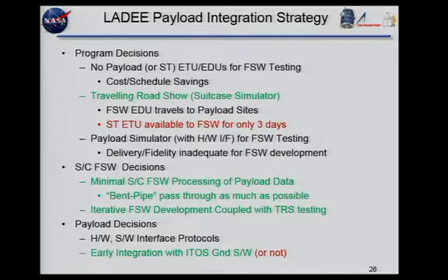We should have planned to go somewhere and do more integration testing. The other thing that was planned was to have a payload simulator that we would test against. It turned out that was delivered too late to be useful for flight software development, but it was useful for integrated testing and also for the operators to get the feel of testing and getting something that looked like payload data coming back out of it.